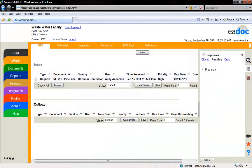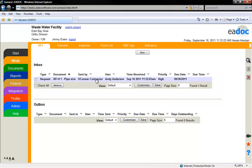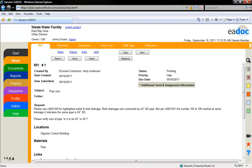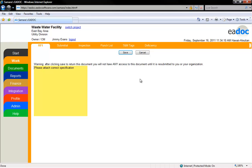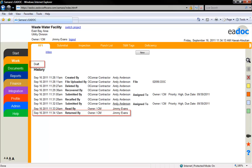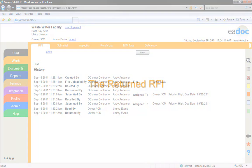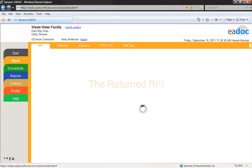If you are the recipient of a document, you may have the ability to return the document to the creator if you notice that something isn't correct. Select the document either from your Browse box or from your Inbox. Once you click the Return button, you will be given the option to attach a note to the creator explaining why you are returning the RFI. Once you click the Save button, you will no longer have access to the document. Only the document history will be visible to you. When the creator logs in and looks at the RFI, the note will open up automatically.